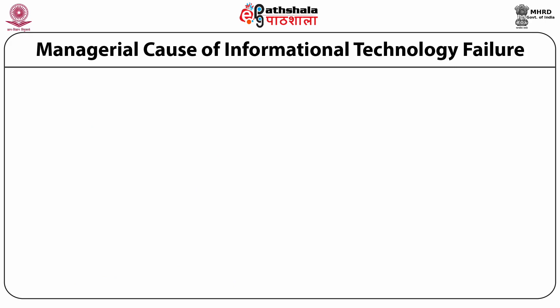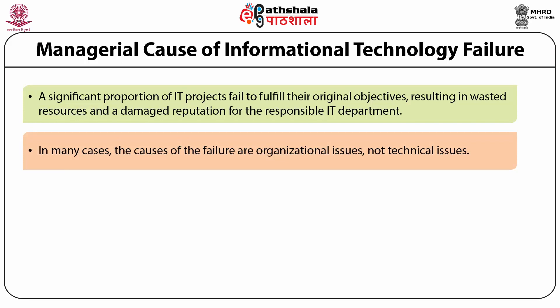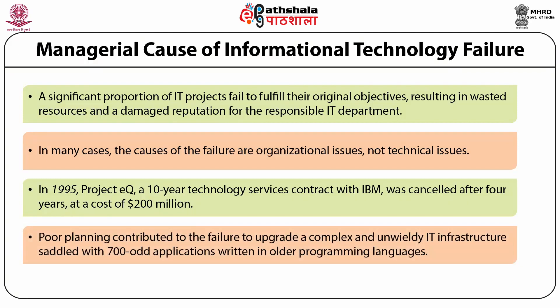Let's take up an opening case of the managerial causes of information technology failure. A significant proportion of IT projects fail to fulfill their original objectives, resulting in wasted resources and a damaged reputation for the responsible IT department. In many cases the causes of failure are organizational issues and not technical issues. For example, Qantas, the Australian National Airline, endured two high-profile IT failures in recent years. In 1995, their project EQ — a 10-year technology services contract with IBM — was cancelled after four years at an estimated cost of $200 million. Poor planning contributed to the failure to upgrade a complex and unwieldy IT infrastructure saddled with 700-odd applications written in older programming languages.